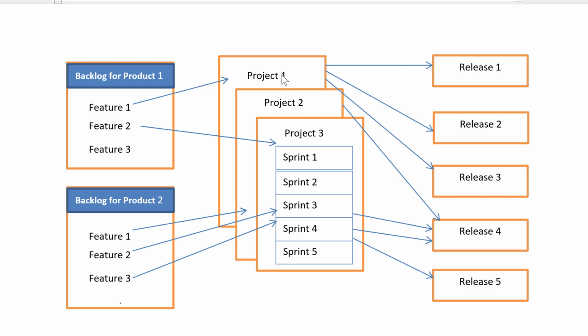So in Rommana ALM, the very first step before creating a project is that you have to create a product or a system or a subsystem. It is really the piece of work that's supposed to have certain features, and those features possibly are in a backlog or not. I'm sure there is a wish list that is available for every product we have. So as a result, we take that list and we put those features or those items in the backlog to be implemented in certain projects. Keep in mind, those projects could be running at the same time.